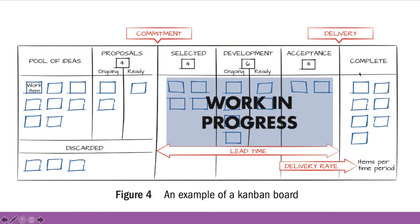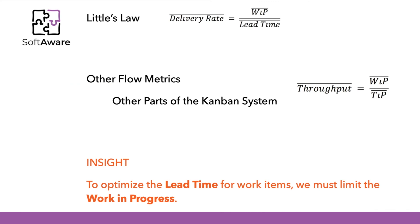By entering this last development stage, it is possible to compute both the lead time and the delivery rate to finalize the items per time period. If we consider Little's Law, it is possible to compute the average delivery rate within a project team by establishing the ratio between the average work in progress and the average lead time. This is actually the base formula to establish the average throughput for a specific stage or set of stages.